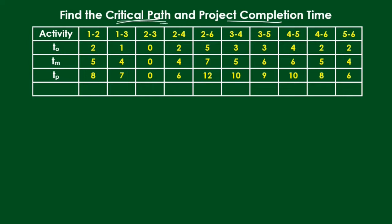For each activity the optimistic time (T0), most likely time (Tm), and pessimistic time (Tp) are given. For activity 1-2: if everything goes perfectly as per plan, we can complete it in 2 days. The average time of completion is 5 days, and if everything went wrong, the pessimistic completion time is 8 days.